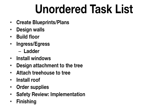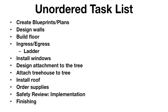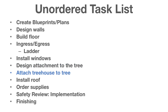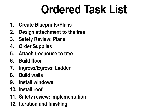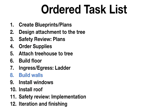Here is a list of tasks for our treehouse in no particular order. We need to design the walls, create the blueprints, and decide how we're going to attach the treehouse to the tree and then do it. Now let's put a basic order or structure to this list. For example, we can't build our treehouse before we order the supplies. We can't create our windows before we've built our walls.